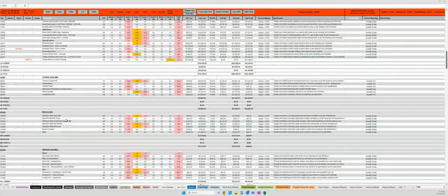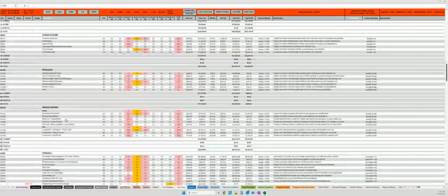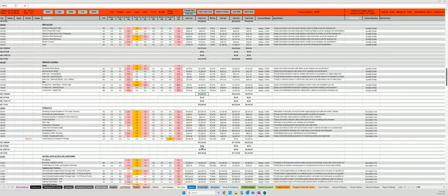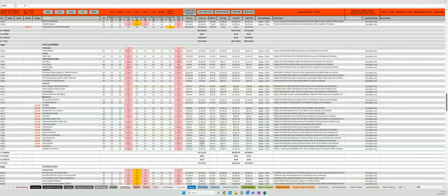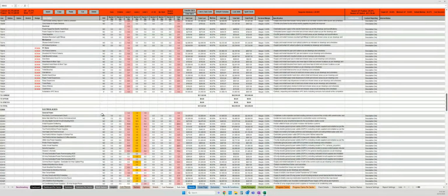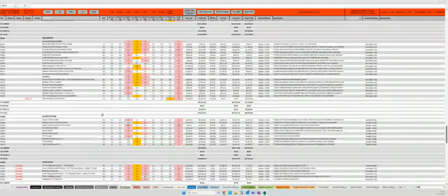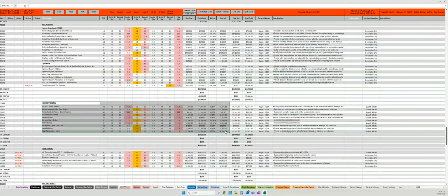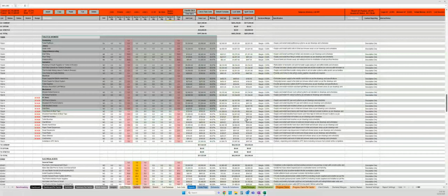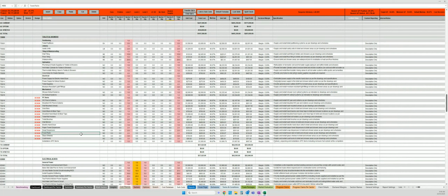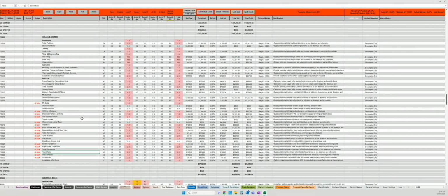We've already set some targets. Where have we not set any targets? On a package that might have a lot of cost. And I'm looking through and I can see we've set targets throughout. We haven't set a target on the security system. We haven't set a target on the toilets and showers package. So let's set two little targets, trying to make some savings there. Let's break these down into smaller individual components that are more realistic, because we want these targets to be achievable.